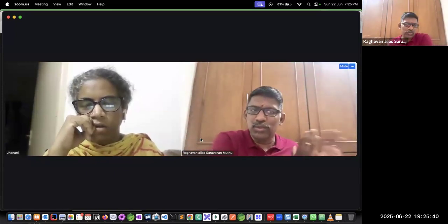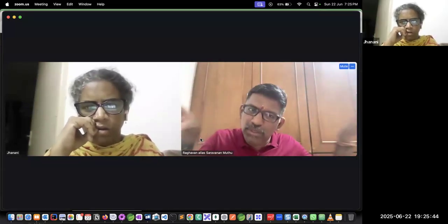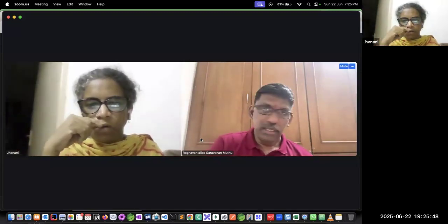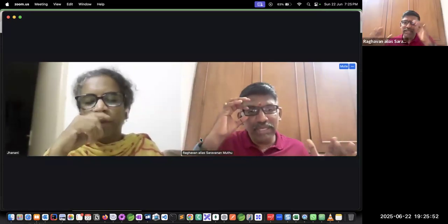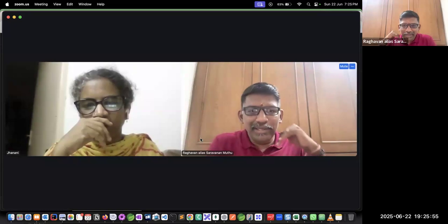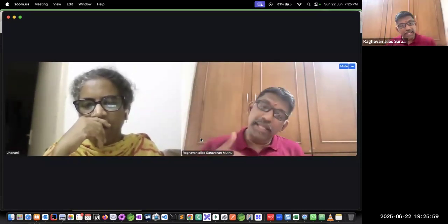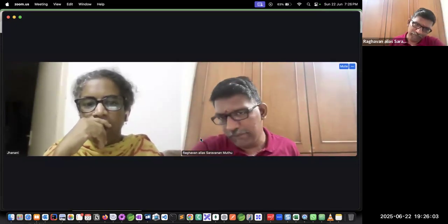It will not be there in the source project. Cloning will retain it in both places. If we update in one place, the other place will not be updated. At the time of creation, you want some values to be pre-filled. Thereafter, it's a separate item. Updating one will not reflect back on the other.